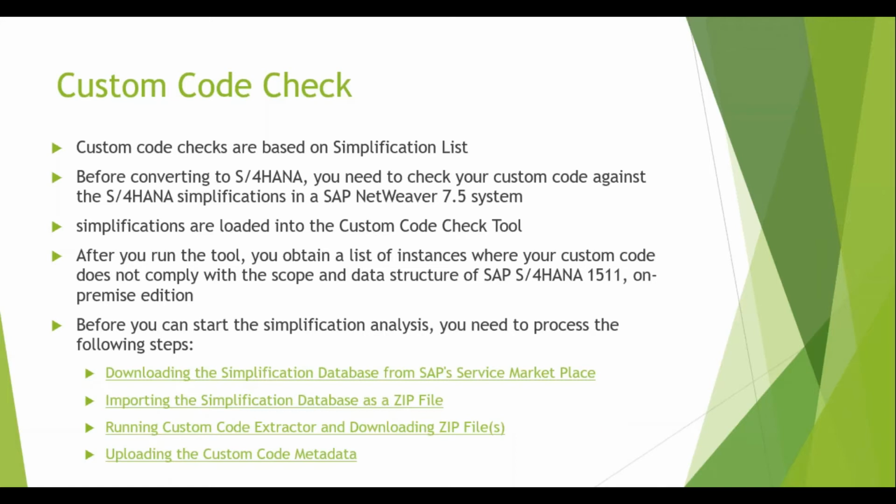Because if you perform the test conversion on development or quality, they don't have the same data which is available in production. So when we are talking about the test migration, it must be done on a production data copy. All the data which is available in production should be copied into one system, and you should perform the test conversion in that copy of the production system itself.